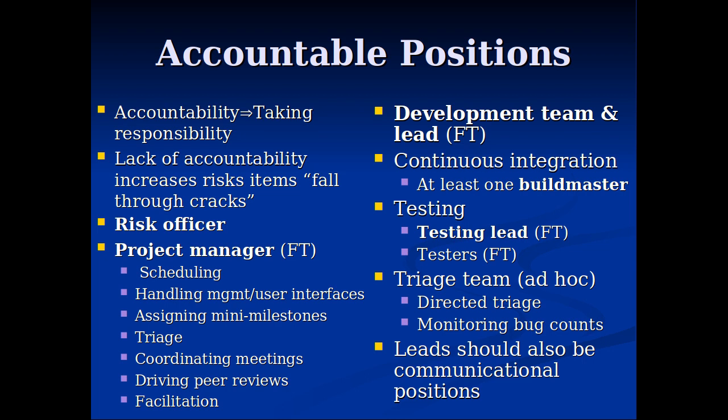things don't fall through the cracks, things aren't duplicated, work is divvied up, work gets done in time compatible with what's planned, or they notify the project manager ahead of time if they're not going to be able to meet a deadline. We thought we could hit this, turned out to be more complicated, these two technologies didn't play well together, and I don't think we're going to hit it. Telling the project manager that ahead of time and moving the risk officer so that backup plans can be made, contingency plans. What do we do if this feature doesn't get developed in time?